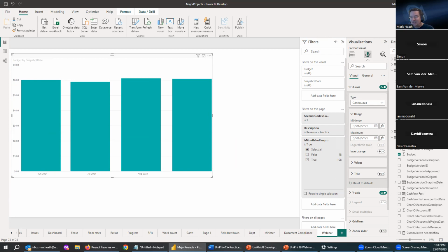There's a business logic change that now, if UniFi is apportioning the actuals rather than an accounting integration, the actuals will be apportioned in the month of the contractor's invoice date rather than the claim date. This was something for some of the people on the call, so I thought I'd just point that out. That's in UniFi 19. So it gives a better earned value profile of the actuals, although you still would need accruals and everything to get that actually perfect. But yeah, the purpose there is to get them more accurate. So when the dollar value actuals are earned rather than when you paid them, or at least approve them to be paid. One last cool one to finish the session off.